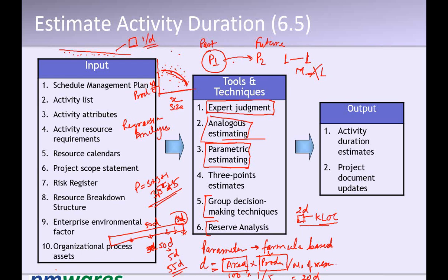Now, when tracking the activities, should I distribute these 5 days across the activities and then track? Normally, we recommend distributing this buffer on important milestones. So put some buffer just before an important milestone, so in case of any delay, you can manage that. It is because if you deliver milestones on time, it builds confidence in stakeholders.